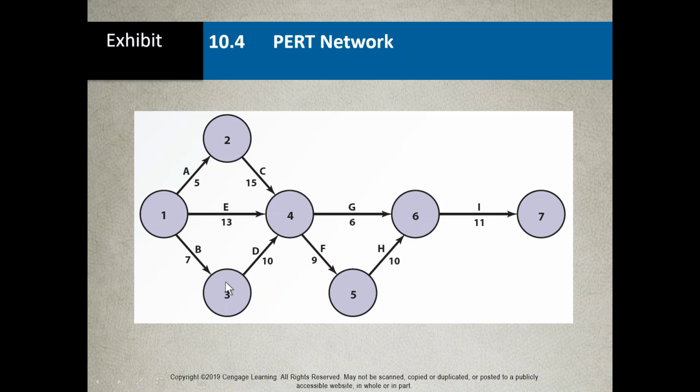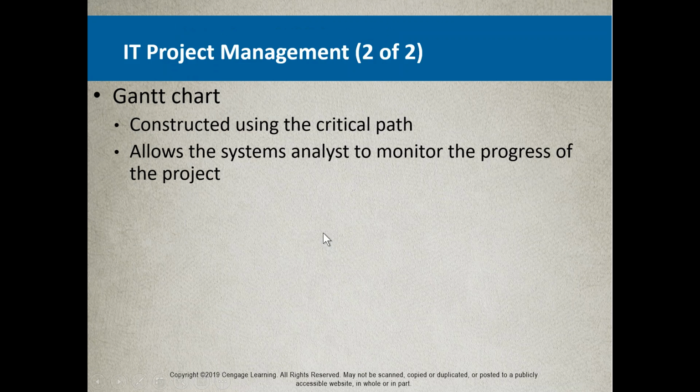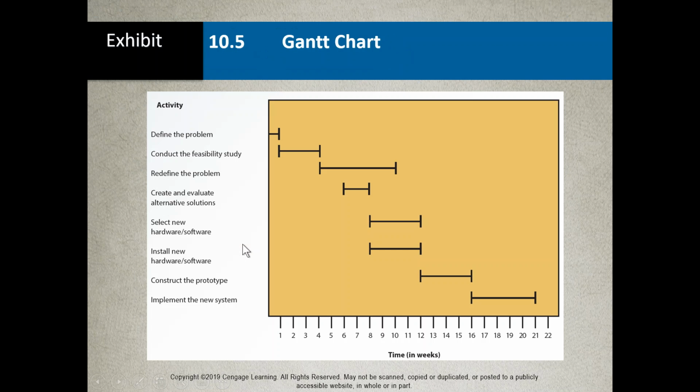So you need to book a venue. If you don't book a venue first and you're out getting envelopes for a wedding, you may not get that booked, and then it doesn't matter about the envelopes because the envelopes are printed with the wrong date on it and have to get printed again. So you need to follow a logic process. So you need to be able to understand what the tasks are at hand to be able to plan that wedding. Gantt charts are great for this kind of thing.